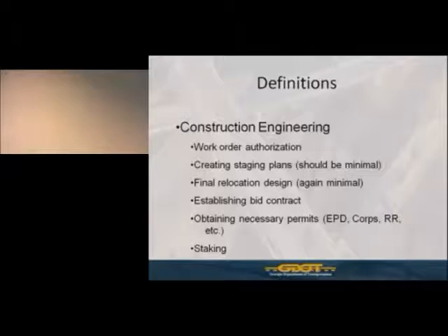as well as staking. And I want to say here, just for clarification, what we're talking about with staking at this point is the layout of your relocation work. This is not right-of-way staking required of the contractor for identifying the right-of-way limits, so we all know where that location is. This is the staking of your actual facility layouts, your relocation work.